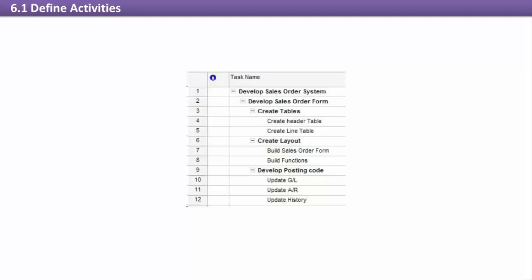It includes supplemental information about the activities, such as explanations of any special dependencies or relationships that exist, assumptions that were made, person responsible for the activity, special equipment or materials needed, or information specific to the activity that will vary depending upon the project's application area and the type of activity. Activity attributes are to the activity list as what the WBS dictionary is to the WBS. The two documents go hand in hand.